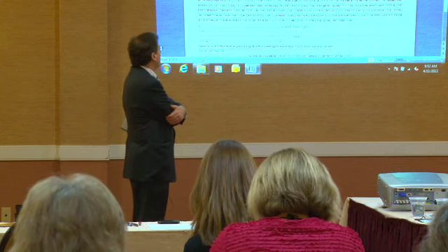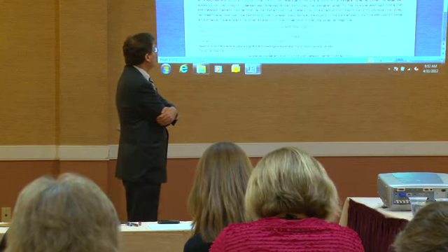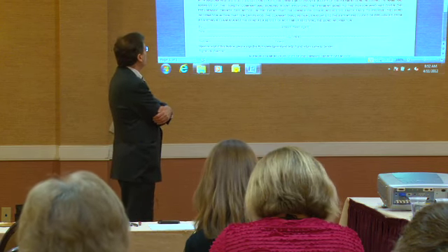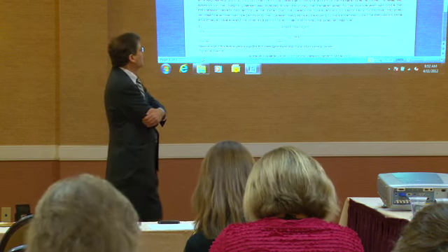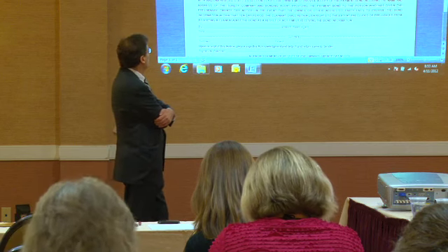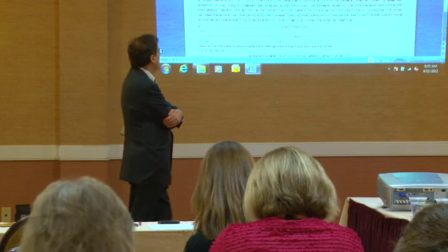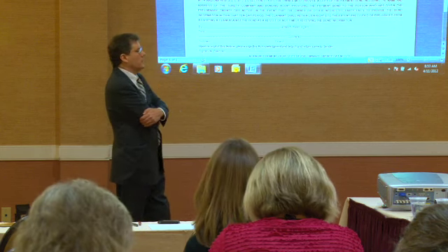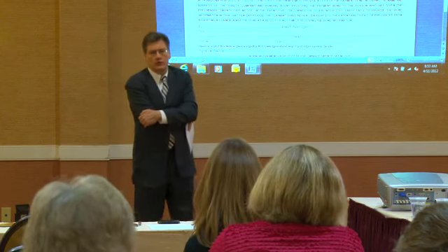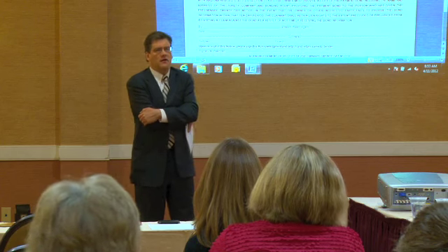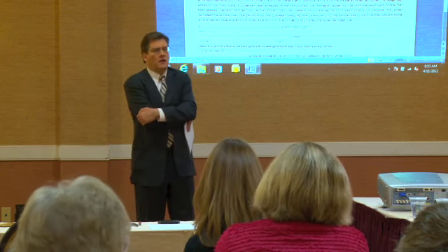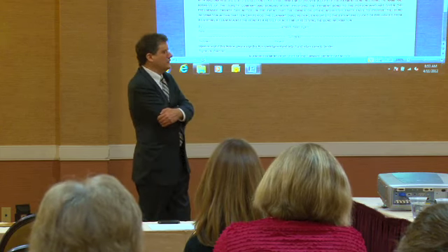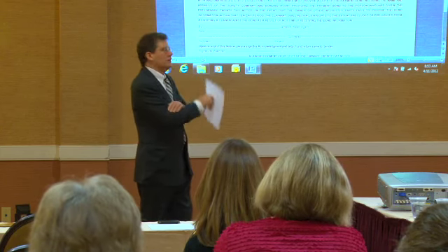Then, below that, within 10 days of the receipt of this preliminary 20-day notice, the owner or other interested party is required to furnish all information necessary to correct any inaccuracies in the notice pursuant to Arizona Revised Statutes 33-982-01, subsection 1, or lose as a defense any inaccuracy of that information. This is a very friendly provision for suppliers, contractors, and builders. They have to be aware of this, that this is a defense to inaccuracies in the preliminary notice.